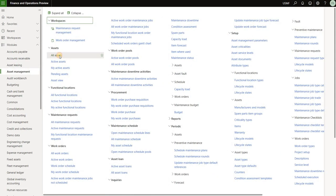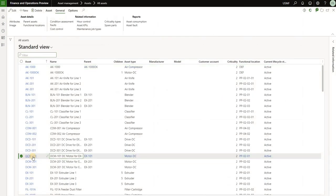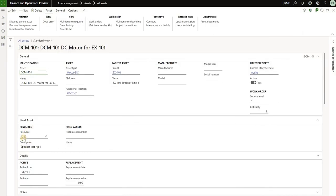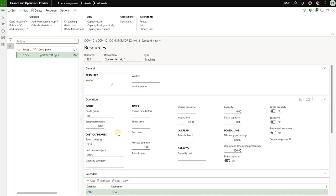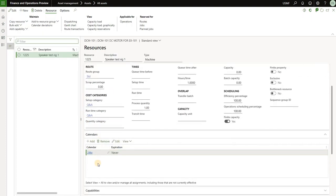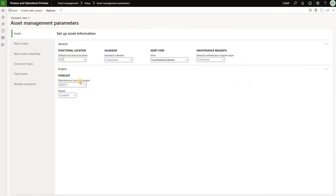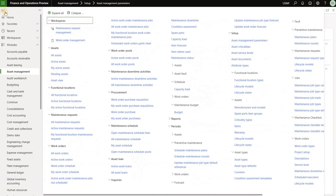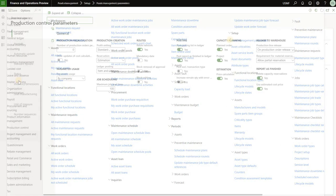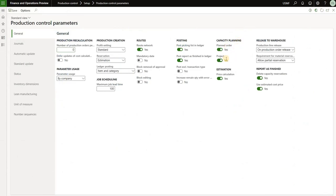First let's take a look at the asset. Here is the asset that I'll be working with and I have connected it to this resource. Here's my production resource. It has a calendar of 24 hours, meaning it's available 24 hours Monday to Friday. Then I'll show you Enterprise Asset Management parameters — right here I have specified my maintenance forecast project as 5.11. And under production control parameters I made sure that my capacity planning includes the activities from the project.